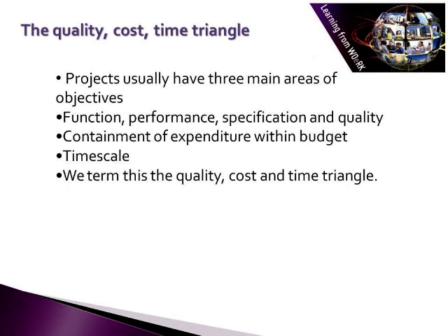Containment of expenditure within budget is the basis of the cost aspect of the triangle. If the development costs, for example with a new vehicle design, escalate, then it could mean that the selling price would have to be increased to recover those costs, which could make the new product uncompetitive within the marketplace. With larger projects, with complex financing, cash flow issues sometimes become important in terms of drawing down funds in order to do the work. Timescale is the third factor.